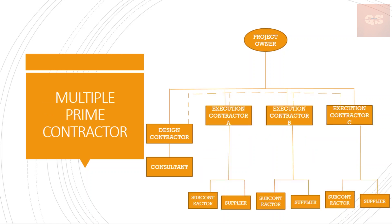The next arrangement is called the Multiple Prime Contractor, also called the Independent Prime Contractor Arrangement. Under this contracting model, the owner still retains the design professional as a single point of responsibility for all the planning and design of the project. However, the owner will then issue a series of construction contracts to different prime contractors. This multiple prime contracting arrangement may be organized by craft or trade — civil works given to one contractor, structural works to a second, mechanical to another, and electrical to another.